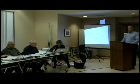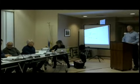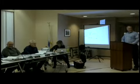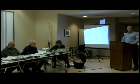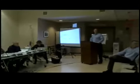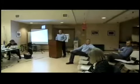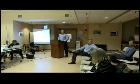Hypothetically speaking, if we were to close for you at the next meeting, when are you planning on starting work? It's a funding issue. I'll have Dave speak to that. Right, we're going through the public bidding process. In order to go to bid, the FAA wants to have permits in hand. Our plan is to go to bid mid-March at the latest. This is a sizable project, so we want to give contractors about 4 weeks to look at the plans before they submit their bids. And the grant application is due to the federal government, the FAA, by May 1st.